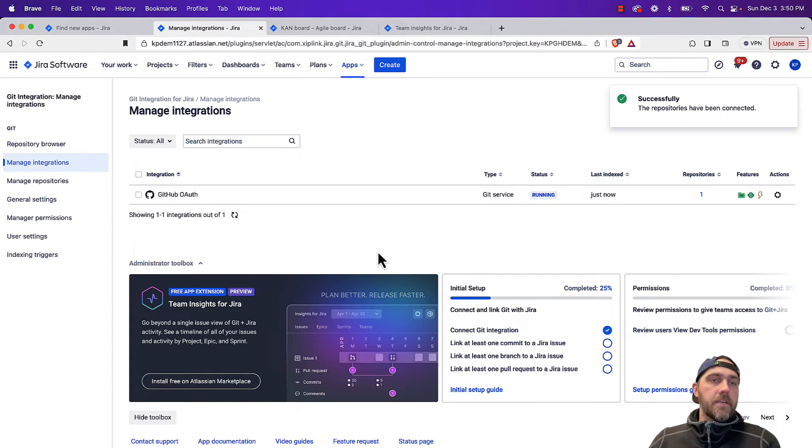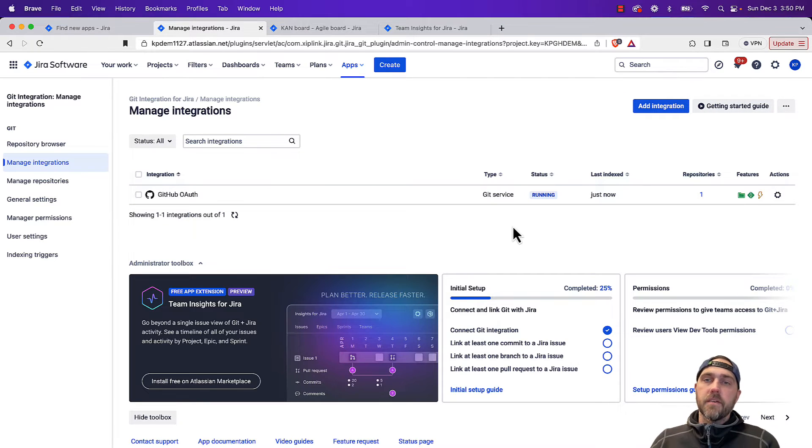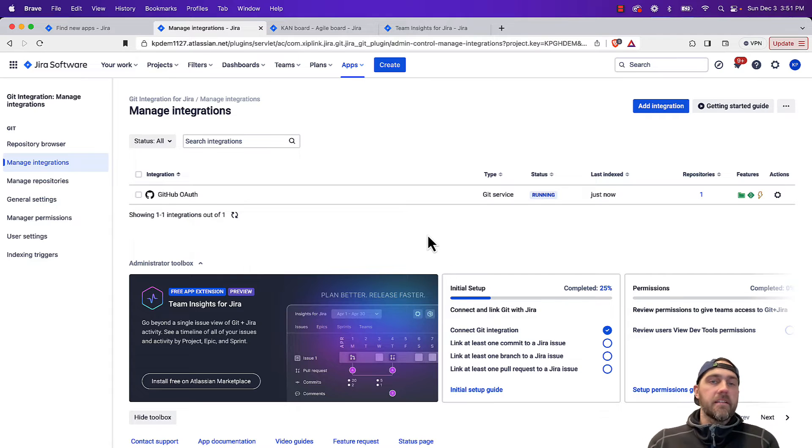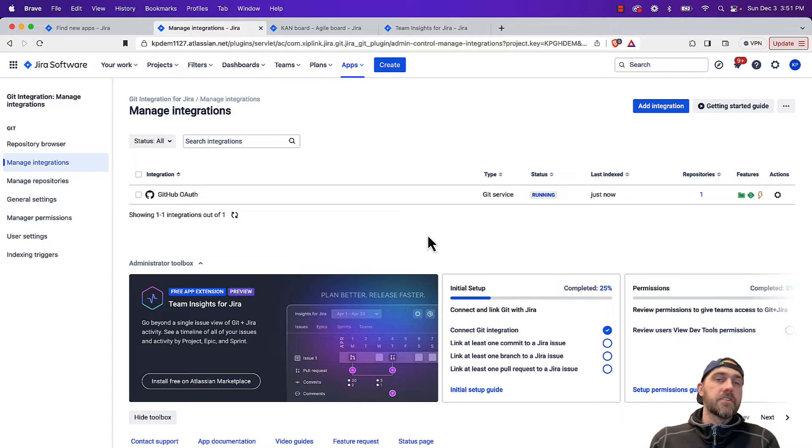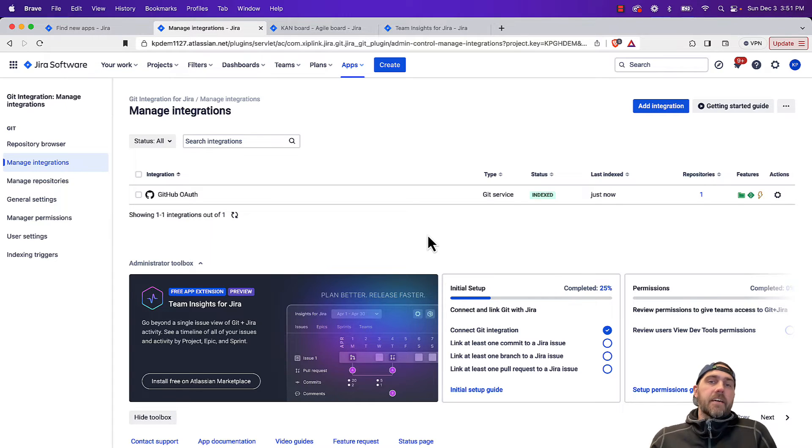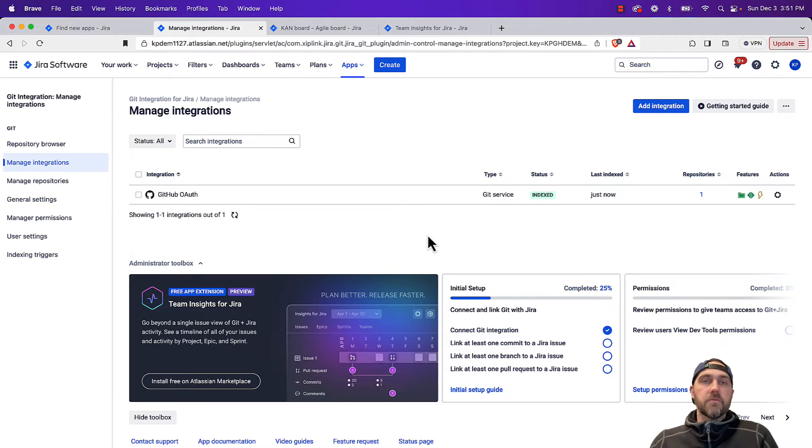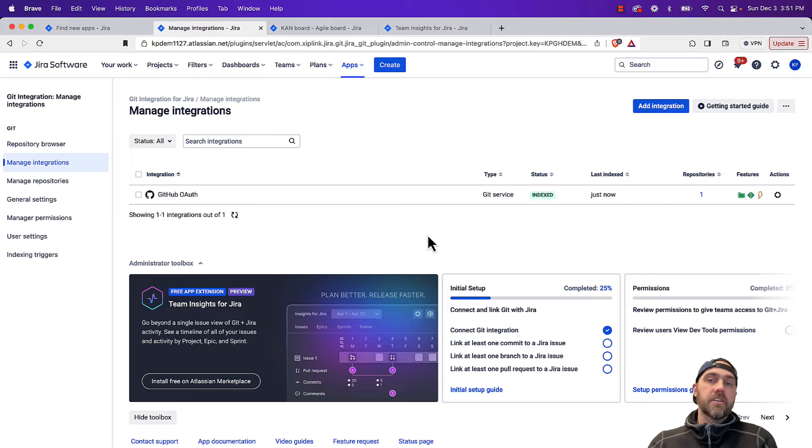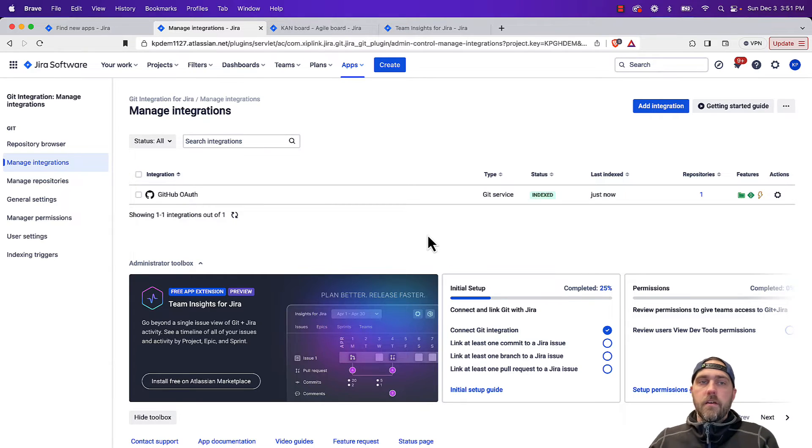So now that we connected our first integration, we have one repository. It's going to run an initial indexing to then go and make the connections between your commit messages and your Jira issue keys. So the way to make a connection between a Jira issue and some sort of development is when your developers are making commits, they just need to include the associated Jira issue key in that commit message.